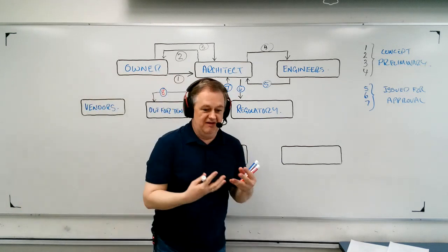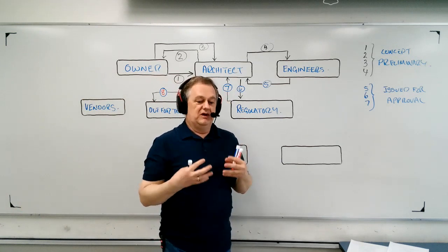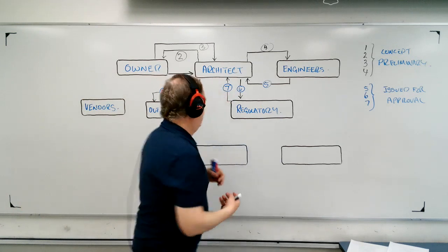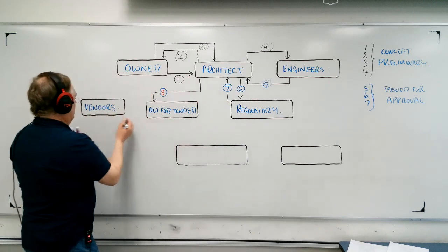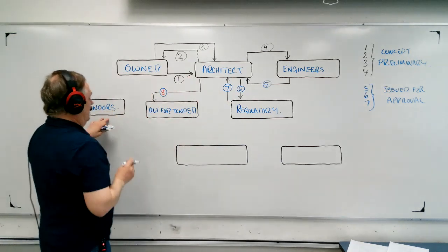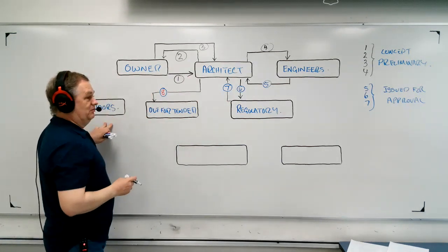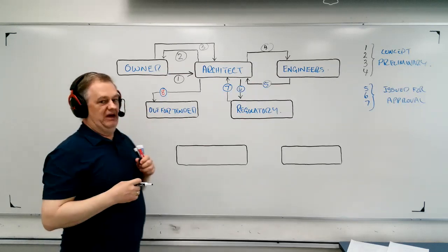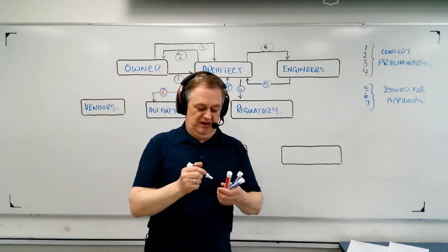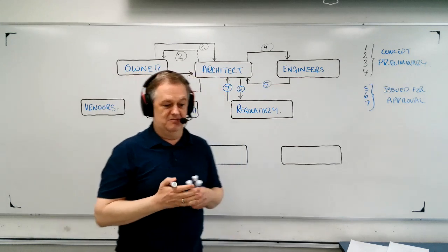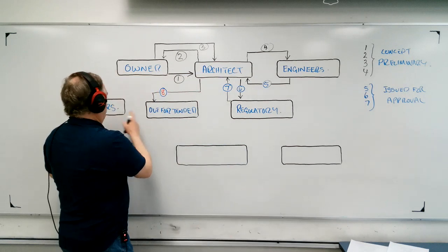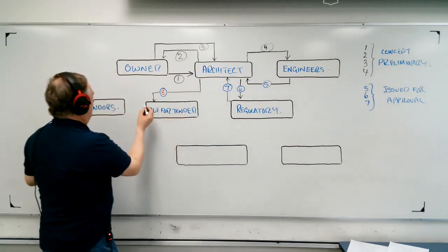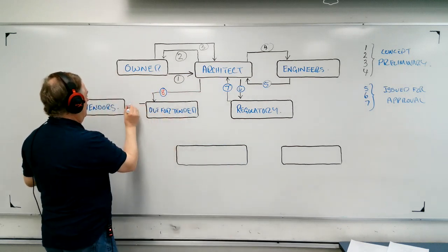And the next step in the construction drawing process is that the people who are actually, they don't even know if they have the job yet. But what they're doing is making up a bid package. And so they'll send it out. And now this could be 1, 2, 3, 4 different people that they send this information out to try and find out what the best price and who's going to give them the best product and the best timing, okay, to meet their timelines.